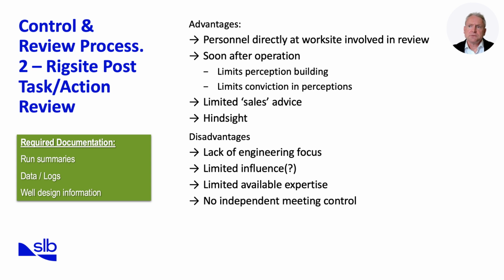However, this type of review does have limitations. The focus may be narrow, with less emphasis on broader engineering implications, and the available expertise can be limited compared to a larger forum. Additionally, there's usually no independent facilitator, which can affect objectivity. To maximize value, documentation is essential. Run summaries, rig data and logs, and the well design information must all be captured. These rig site post-task reviews provide immediate learning that can be carried into the next stage of evaluation. Building on this, the next process step expands the scope to a more formal engineering review.